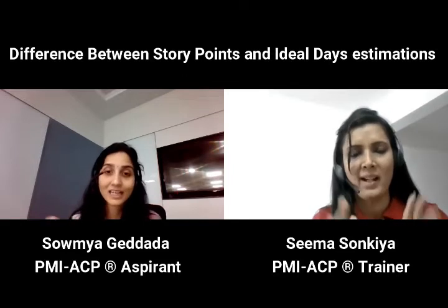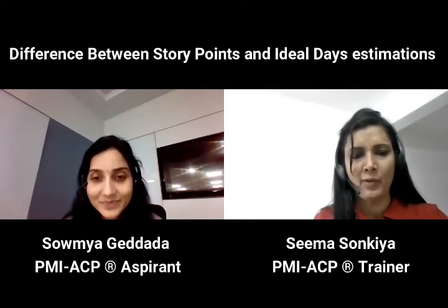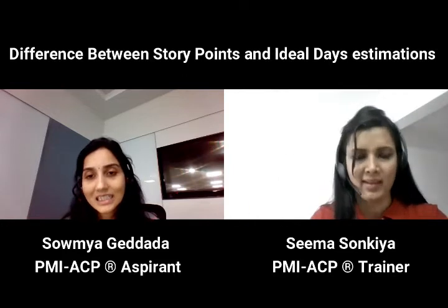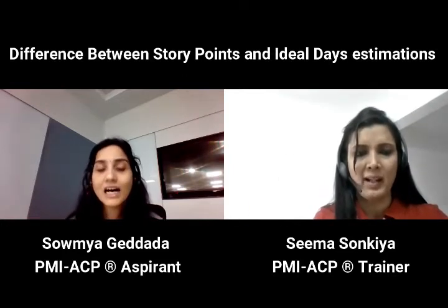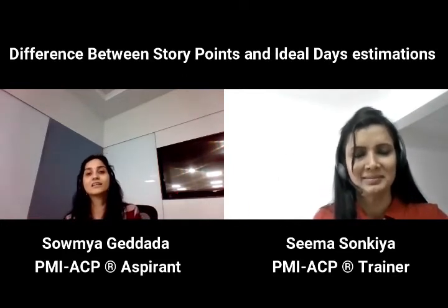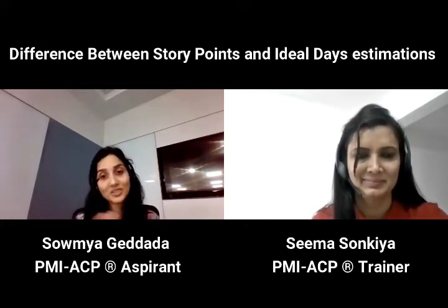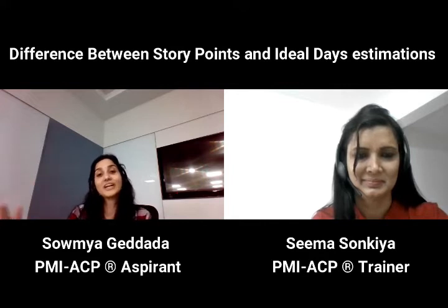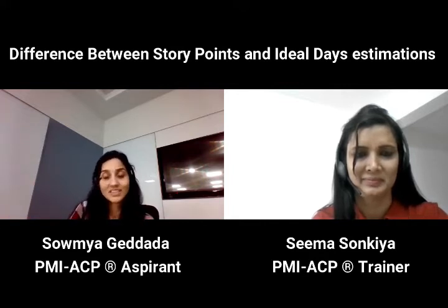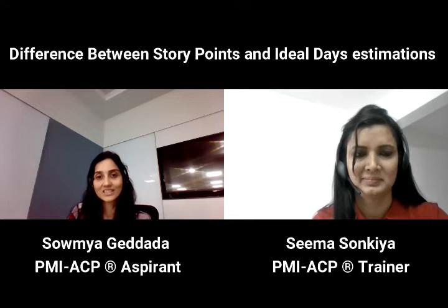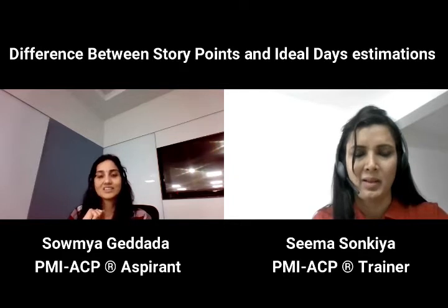Then we are lagging a lot. Instead of giving 4 days, you can give 4 to 6 days. But even then, it may increase to 8 days because of the complexity, or rework, or change in the request or something. There are some scenarios like that. Maybe the complexity, or the lack of expertise in giving the estimations; generally we face these scenarios.